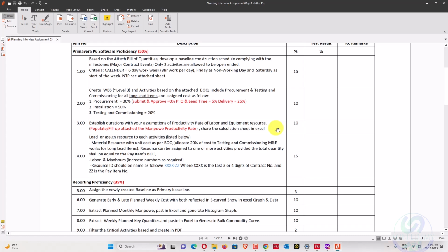We will not go into the hassle of concrete items, steel items and so on. I will just go for the BOQ items and import them as quantities. We'll import the cost as a separate material resource, so we can show that cost separately and it can be maintained in future also.